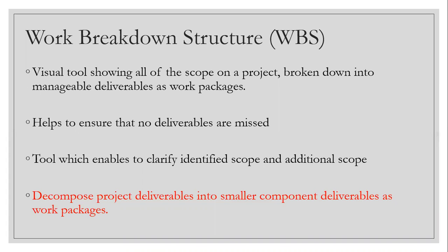Okay, so like I said, a big project, like you want to transfer all the data center data of a company to cloud. That particular project ABC will be broken down till we reach work packages, and we will not further break down the work package into activities because that is after the WBS step. What we are trying to do is sign off a scope baseline, and scope baseline means project scope statement plus WBS dictionary. Once we get these three done, then we can sign it off saying this is the scope baseline and get it signed from the project sponsor as well.